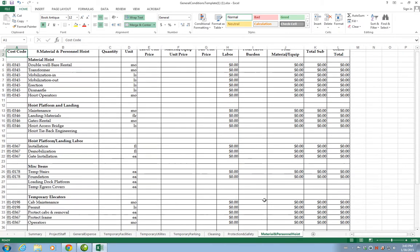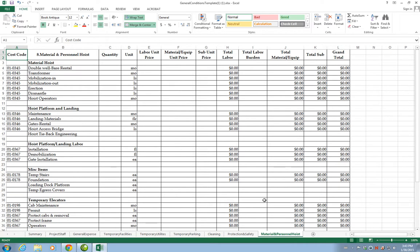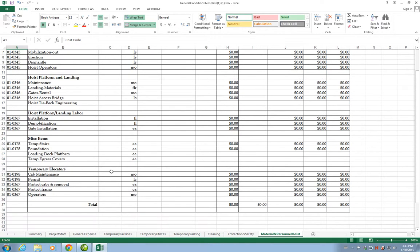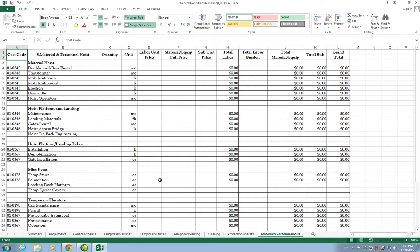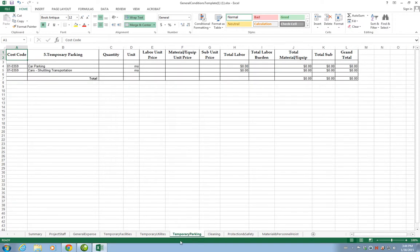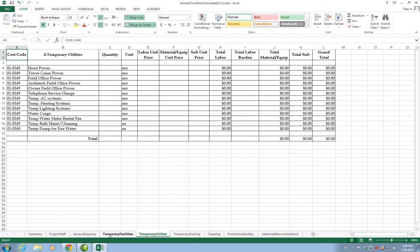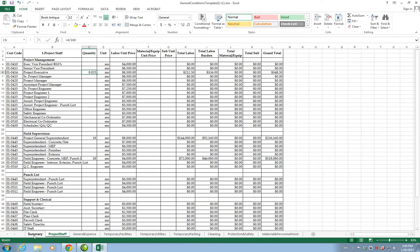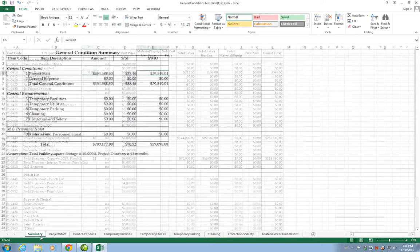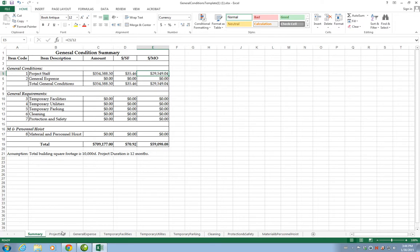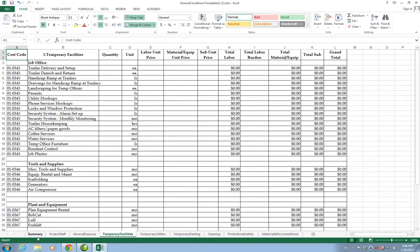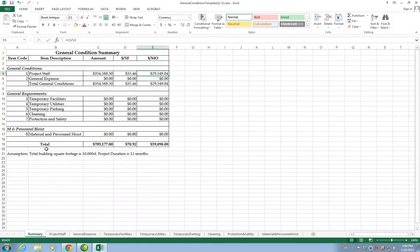Then we have material and personal hoist. If we need to have a crane, if we need to have a forklift, whatever the case may be, we will enter the cost and the quantities in here. Some of these materials equipment do not have a cost, so you need to really figure out how much that cost is going to be. There are different sources for cost, like cost books. There is the internet. You can browse for rental equipment, figure out how much they charge. You can go online and figure out the cost for some of these equipment. After you have entered the data for the cost that you have in general conditions, then you are going to save this file.